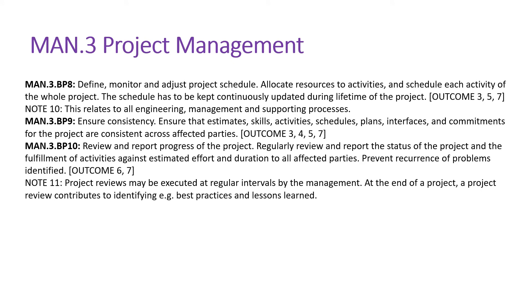BP8 talks about define, monitor, and adjust project schedule. Allocate resources to achieve and schedule each activity of the whole project. The project schedule has to be kept continuously updated during the lifetime of the project. You will revise your plan many times - that is okay. You need to allocate the resources, monitor the schedule, and revise the plan throughout the life cycle to adjust all your activities - engineering, management, and support processes - in line with the client expectations or your own product expectations.